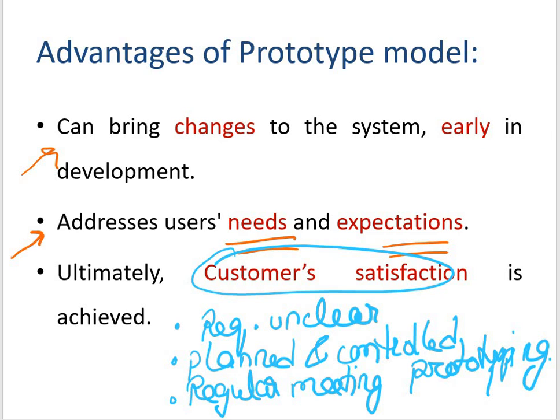At a very large scale, you need to approve a prototype and only then allow the team to move to the next step, because in a large application the team size will be large, and based on that everything will be interdependent.